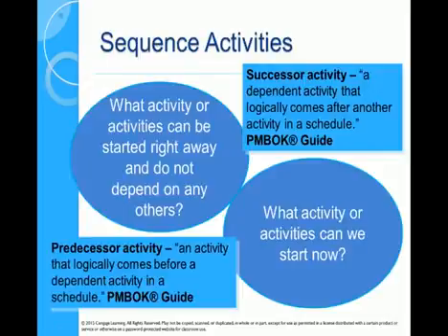Once you've got your list of activities, you need to sequence them. What goes first, what comes second, and really the main concept is we're going to have to complete things before we can start other things. So that's a finish to start relationship. But independent of that relationship, we have what we call a predecessor activity, something that needs to go first, needs to be completed before we can have a successor activity, the thing that comes after the predecessor has been completed.